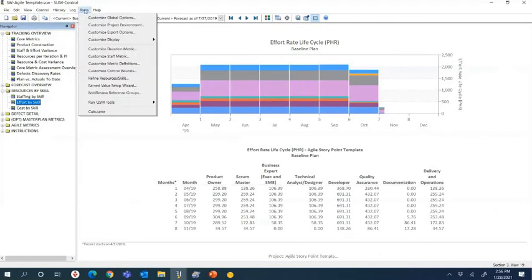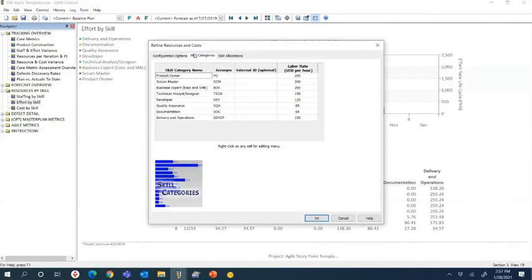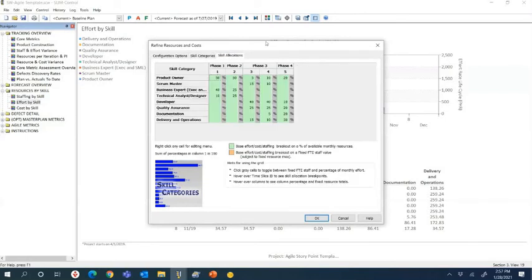And all of that is tailored here. We have this whole area where we can break everything out with the different labor rates, so we can get you the estimates at a detail level as well as a macro level. And the skill allocations, these are all broken down on a percentage basis. That's how we figure out, is it going to be 6 months or 12 months?